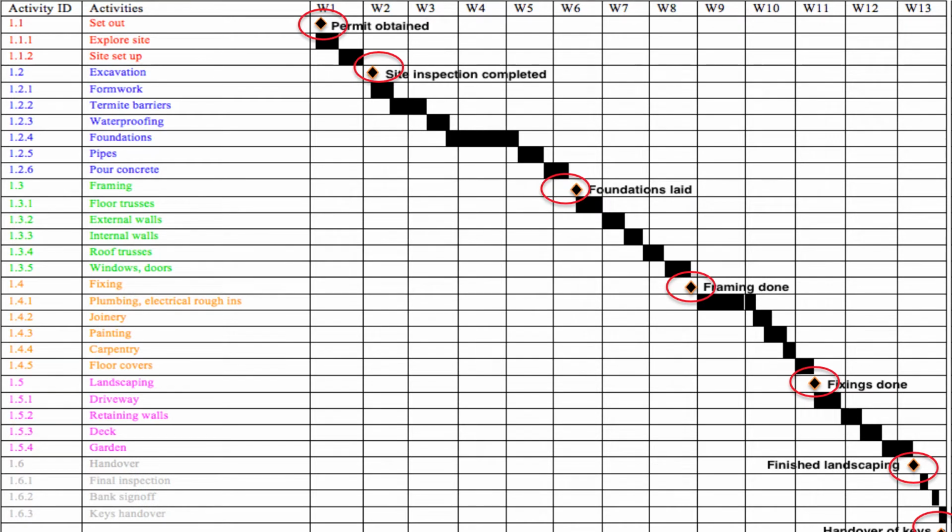What else can we see on this Gantt chart? Well, remember those milestones? Here's a quick recap. We represent milestones on a Gantt chart by black diamonds. They're not given a duration or a name. How many milestones a project has depends on its duration and complexity, amongst other things. I place milestones at the start of a project to represent the moment in time that the work starts, and one at the end to represent the moment that all the activities are complete. In between, you have milestones when a key amount of work has been done, for example when a deliverable has been achieved.